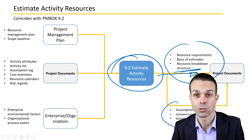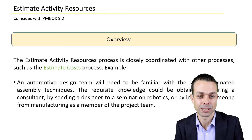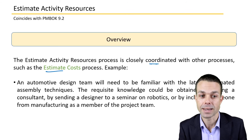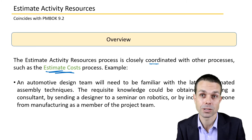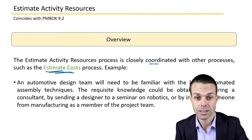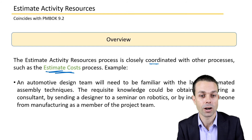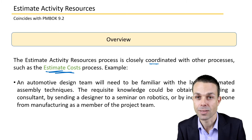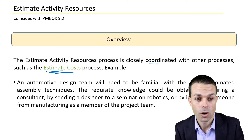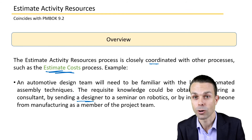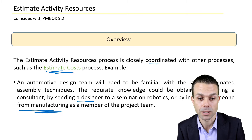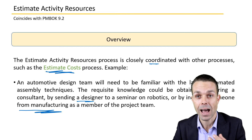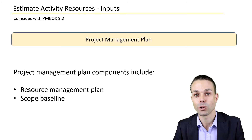Estimate activity resources is closely coordinated with other processes, such as estimating costs, because we need to know how much acquiring people or materials will cost. For example, an automotive design team may need familiarity with the latest automated assembly techniques. This knowledge could be obtained by hiring a consultant, sending a designer to a robotics seminar, or including someone from manufacturing as a team member — there are many ways to acquire resources.